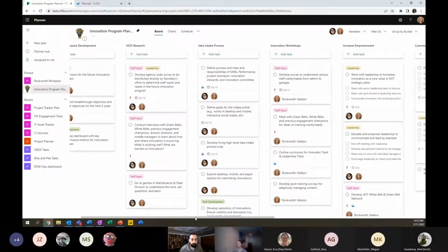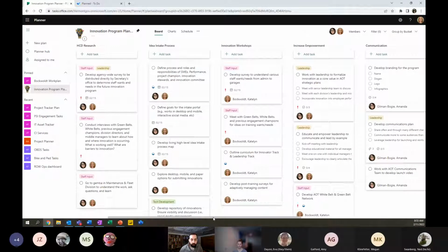You can categorize your buckets however makes the most sense for your project. So if you're doing a typical Kanban flow, your buckets might be phase 1, phase 2, phase 3, phase 4, phase 5, and then all of your individual permits, for example, would move through as tasks between each of these 5 phases. But how I use it for project management, I more or less create categories within the project that need to be worked on.